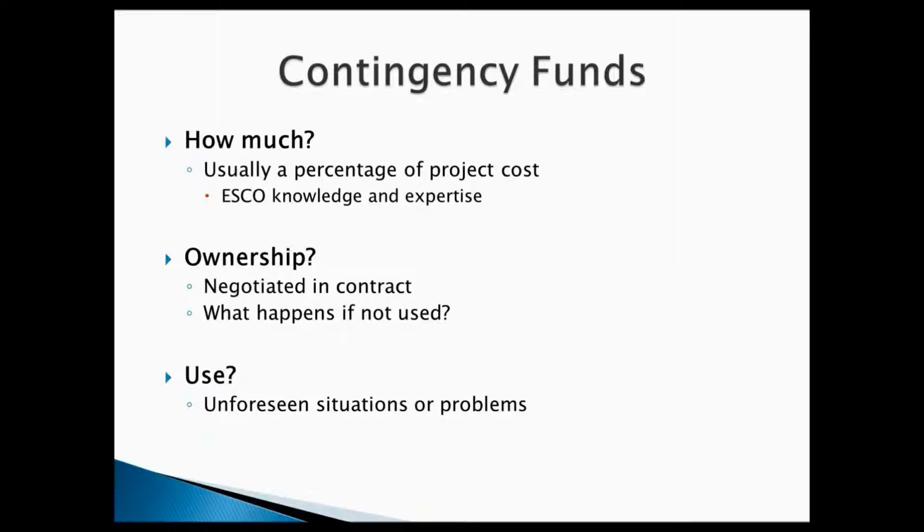The question of ownership always comes into play with contingency funds. The ownership of the contingency funds should be negotiated in the contract. And the reason for that is the next question: what happens if it's not used? If you've got one of those projects where nothing came up and you don't use the contingency funds, who do they belong to? That question of ownership, like I said, should be negotiated in the contract.